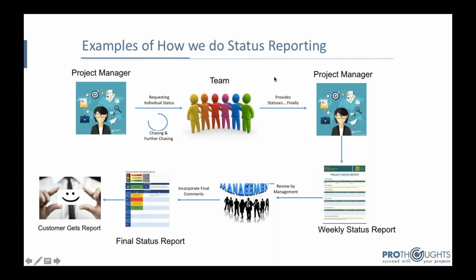The other part is that the effort the project manager and the team spend on the report is too high to produce a stale report. Imagine a 10-member team, each spending say half an hour to update the tasks. It's like 5 hours. The project manager is literally spending 2 working days compiling and collating the report. The management team, expensive resources, spend say an hour or two on this. Project managers 10-15 hours, team 5 hours, so 20-25 hours in a week to produce a stale report.